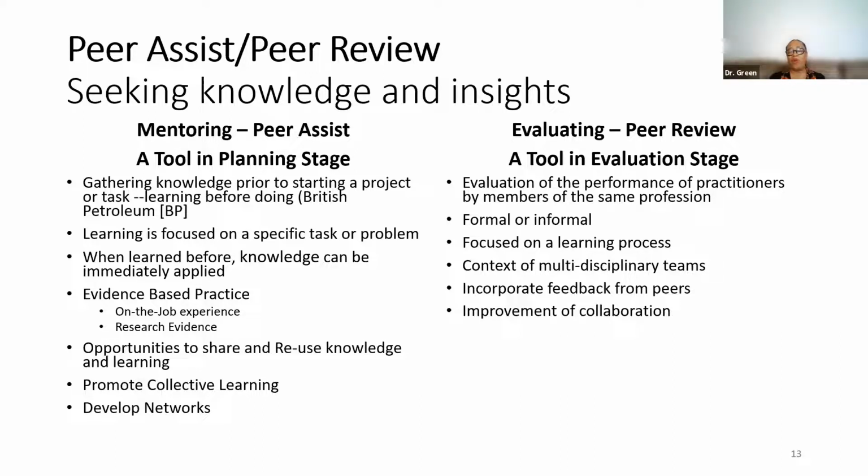This can be formal or informal. A lot of times at the end of a session or where milestones happen, you do a formal review. But when I'm doing projects, I have informal peer reviews and I pair people up. Here you go with peer assist and also peer review. So when you finish something, you have a peer review with one of your peers so that they can look at it, and they know what they're looking at and how to evaluate it. And a sheet is turned in so that we know that we're on the right path.